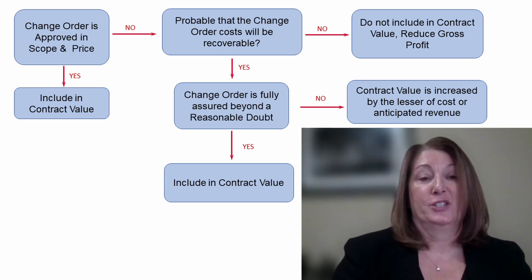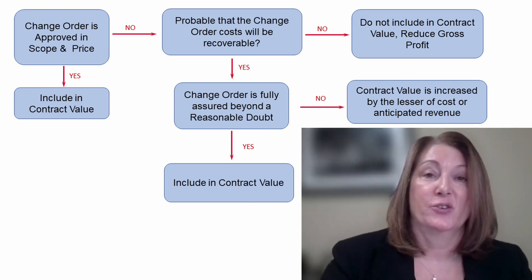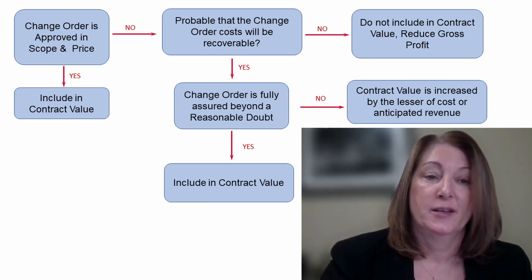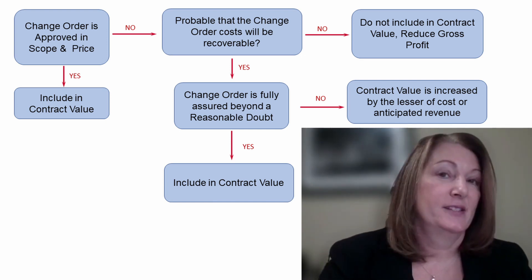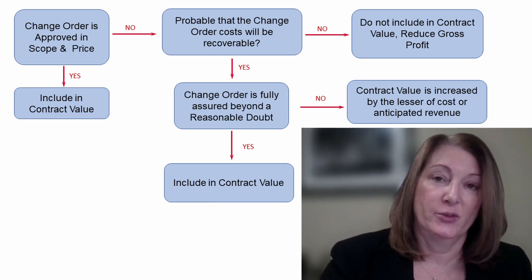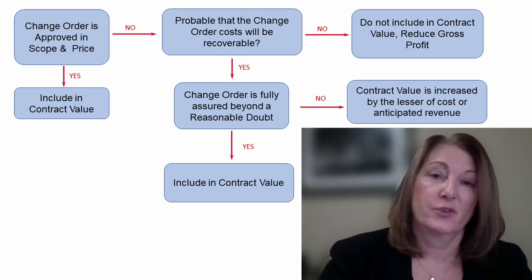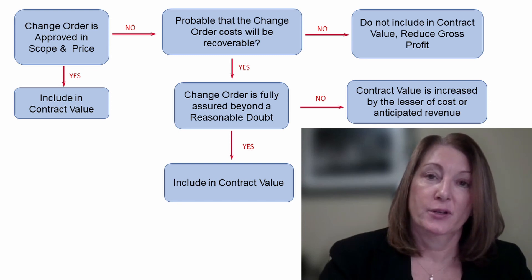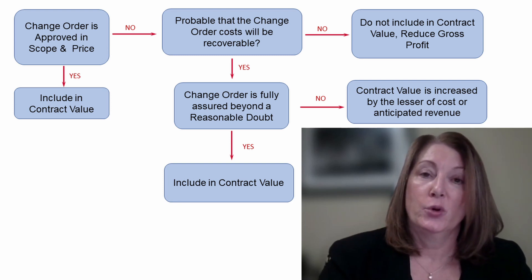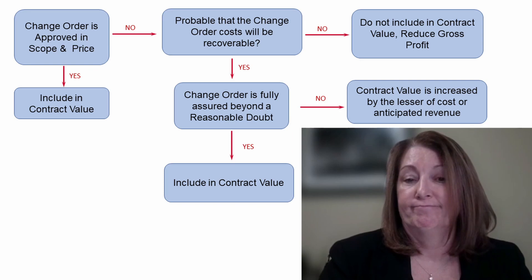If your answer is yes — approval and receipt of the change order is assured beyond a reasonable doubt — then you'll recognize the value of the change order in your contract value. You will estimate the cost for this change order and you will pick up the gross profit based on your percent complete.